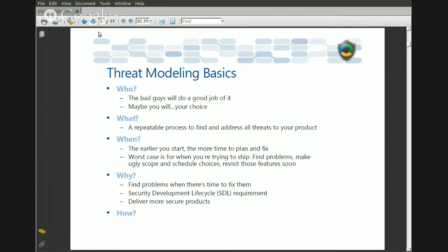What is also good to do with the risk spreadsheet is to use a risk tracking system. You identify a threat, you have a new risk, and you start tracking it in the risk tracking system, and it sends out an email to the person responsible for handling that risk. If it's a high-level risk, they get an email every day. Doesn't matter if it's a Saturday, they're still getting an email. So it's always on their mind, and there's always some type of stand-up meeting to say, hey, how are you doing with the risk? What resource do you need to fix this particular risk? And then you have why.